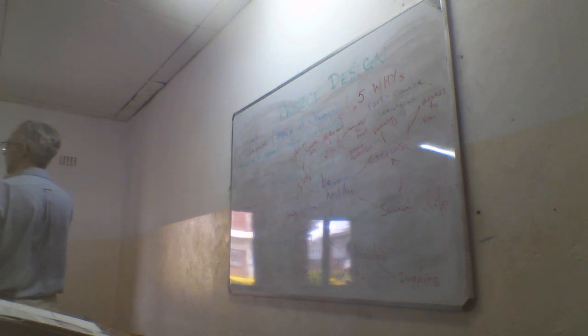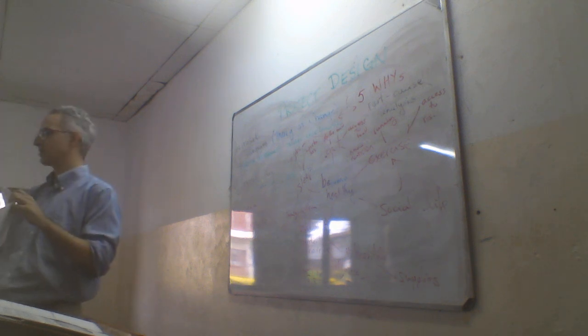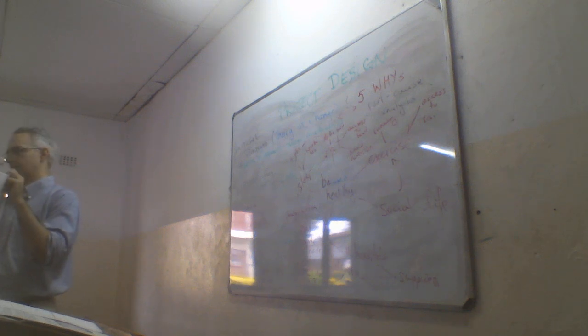Now, what does it mean to have improved access to healthcare? Well, it means we have to either train more doctors and nurses, or build more clinics, or bring more to class. Something has to happen. Right? That has to mean something. You don't just say improved access to healthcare. You say improved access to healthcare means what? Those are the outputs of your project.